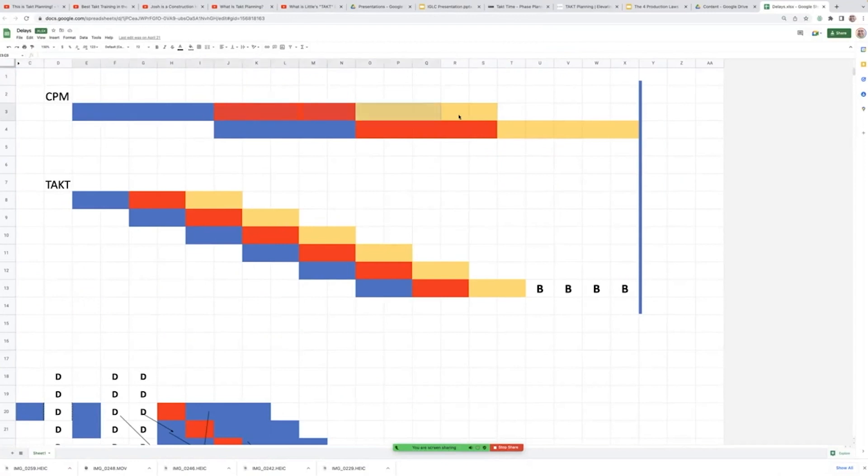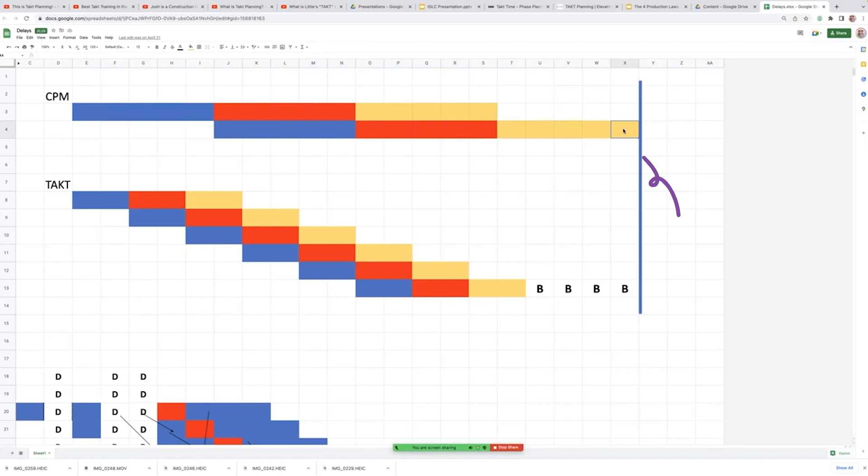So at the top here, usually in a CPM system, you have large batch sizes, you have large zone sizes. And that's not great. And your critical path runs you all the way up to the end to your substantial completion with zero flow.